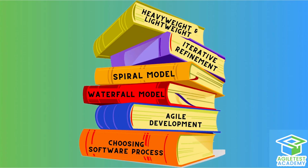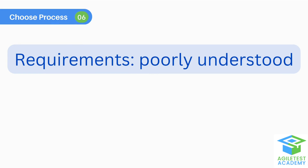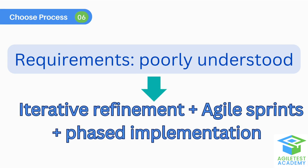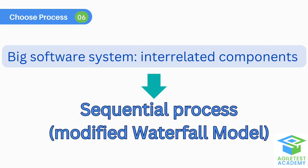We now move on to how to know which software process is suitable for your project or your team. If the requirements are poorly understood or expected to change, use iterative refinement, agile sprint, and phased implementation. If the big software system has many interrelated components and you want to avoid major changes to the design during development, you should use a sequential process, which is a modified version of the waterfall model.